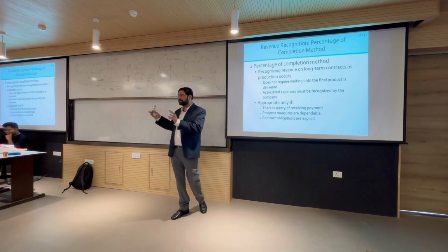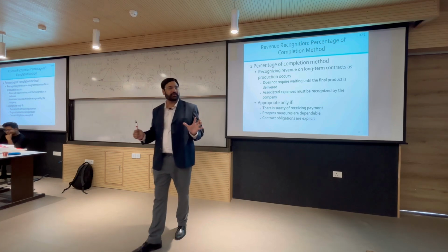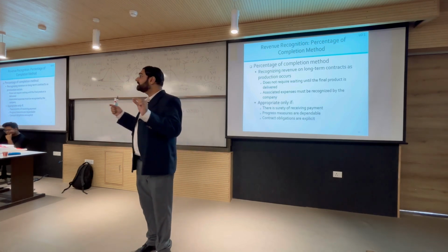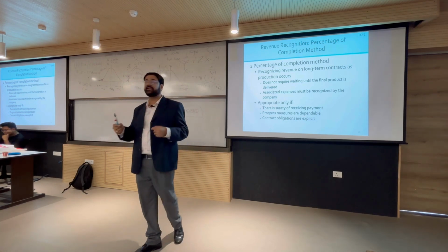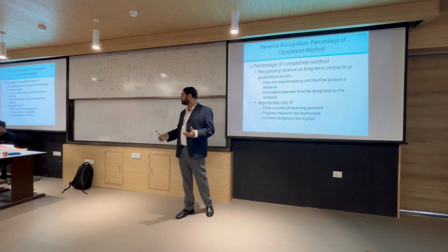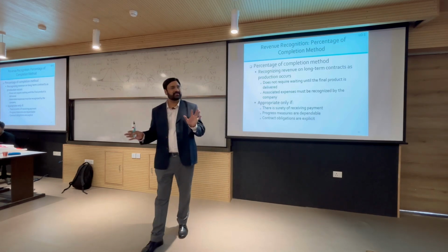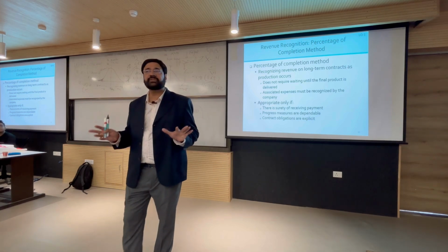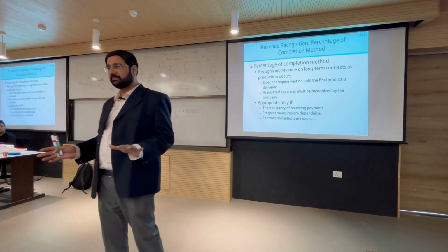So, some part is withheld, but a majority of it is released, so that if there are any errors in construction, if there are any errors in the project, then they are remedied before the final payment is released. This is how mostly a project contract looks like, right?